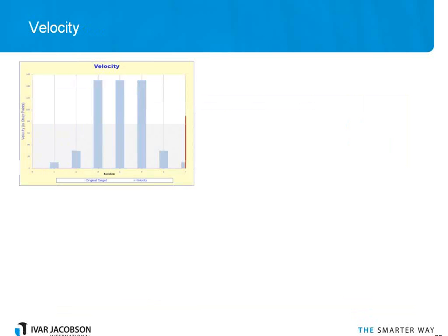Okay, so another very common and useful measure that we see on a lot of agile iterative projects is velocity. Now velocity is actually just the tangent of the progress graph, but we can do some interesting things if we understand velocity. If we're going to have a project and we give it 7 iterations, as is the case here, the grey banding shows the average velocity that would be required to achieve this project. And you can see here we had a low velocity for the first 2 iterations and then it went up. This is the pattern of velocity where we have an S-curve.